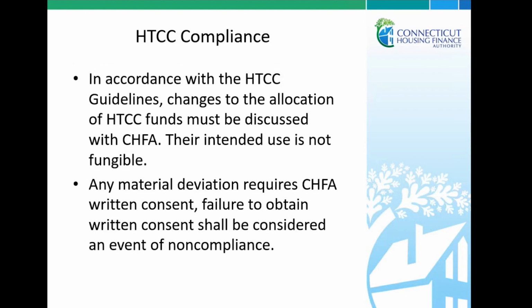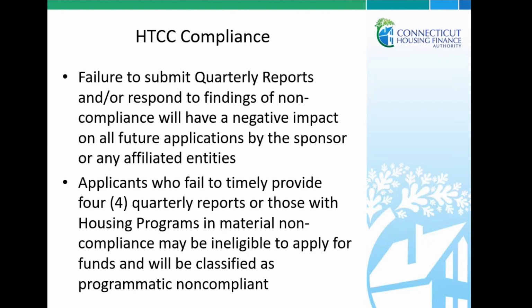Next slide. In accordance with the HTCC guidelines, any changes to the allocation of HTCC funds must be discussed with CHAFA. Their intended uses are not fungible. Also, any material deviation requires CHAFA's written consent, and failure to obtain written consent shall be considered an event of noncompliance. Failure to submit quarterly reports or respond to findings of noncompliance will have a negative impact on all future applications by the sponsor or any affiliated entities.